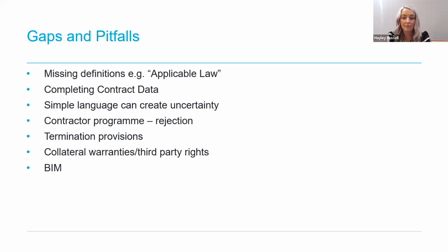Collateral warranties have been a feature of the UK market for many years now, providing contractual undertakings from contractors to others with an interest in the project, such as funders, purchasers, and tenants. Whilst academics and some other parts of the industry would like to see a greater reliance on third-party rights laws rather than collateral warranties, in reality, collateral warranties are likely to remain a feature of construction contracts for a long time to come, so it is good that NEC4 has recognised them.